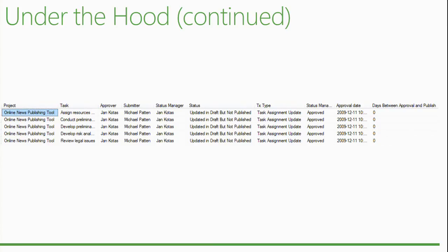But what we found out in most cases is that the users, whatever their role is, are not following the process, because they don't understand how that works. So they think that because they input things into the timesheet or the task update and they close the page, the information flows. It's not what's happening. And I can tell you in 99% of the cases, with all the customers I've worked with, users at different levels complain about the timesheet, the task update. I inputted my data in there. It never came out, right? I did what I was supposed to do. And these types of queries are actually showing you the proof, the audit of what really happened.